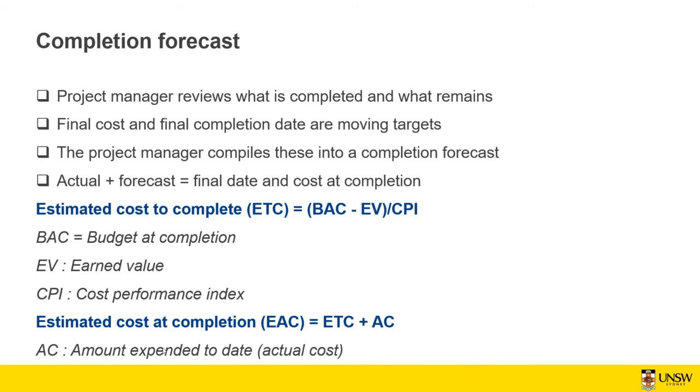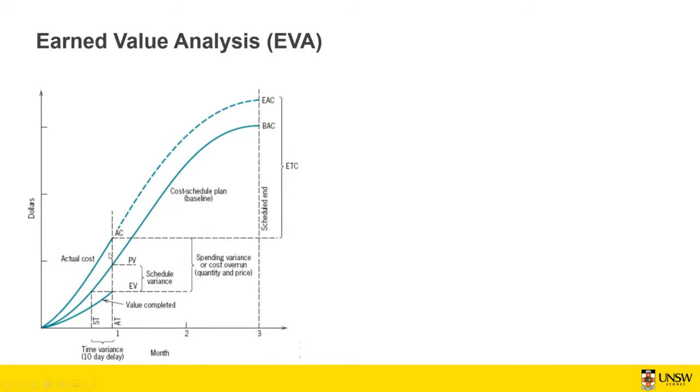Yep, so this is going to be extrapolation. We don't know how much our cost is going to be by the completion of the project. Based on this graph, and the differences between the AC and EV, we predict that the estimate at completion is going to be that much.